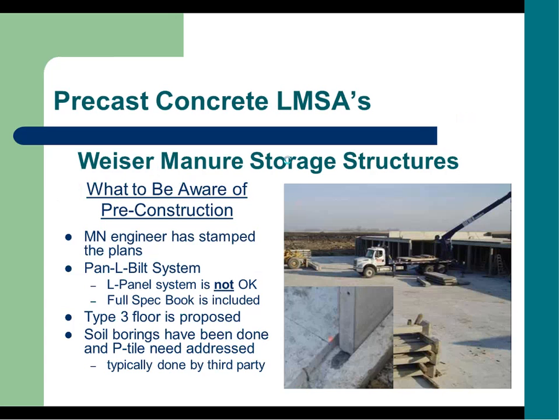When it comes to Weiser manure storage structures, we want to be aware of the pre-construction. We want to make sure that we are all on the same page before these go in. A Minnesota engineer has to stamp these plans. There has to be a Minnesota licensed engineer to sign them. A Pan-L build system is allowed. The L panel system is not okay. And the full spec book must be included.